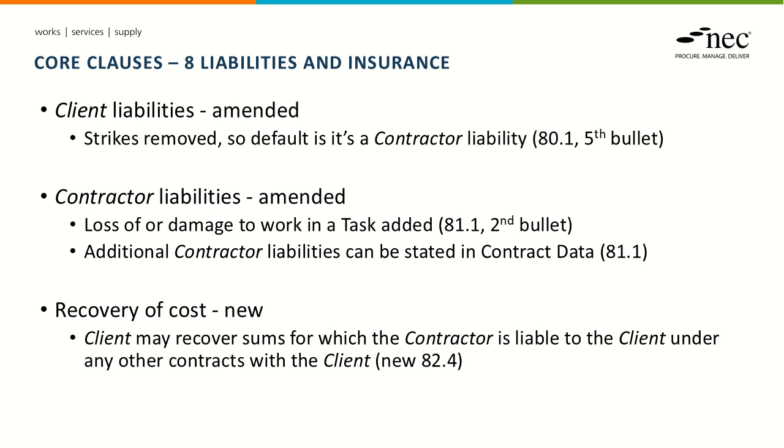In terms of recovery of cost, there's a provision, and again, this is the same as the ECC Hong Kong edition, where the client has a right to recover sums from the contractor for which the contractor is liable to the client under other contracts with the client.